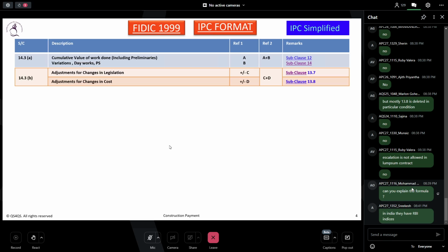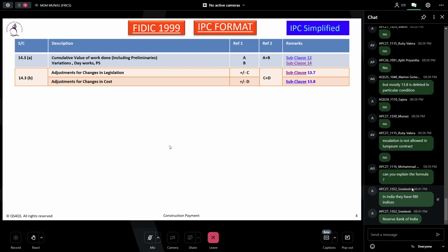Consultants do the cost indices. There are also some governmental organizations that monitor the cost. In Sri Lanka, yes, we have an institution called ICTAD. In India, I think the Reserve Bank is doing it. Likewise, they provide cost indices. This gives the historical changes and highlights the prediction of how it is going to be for upcoming projects.